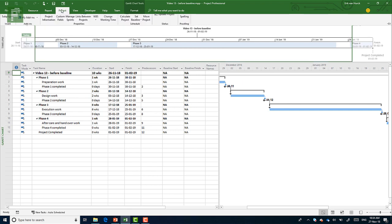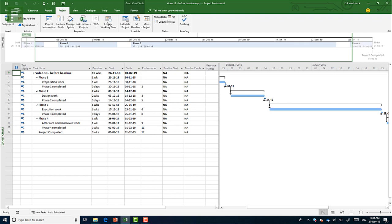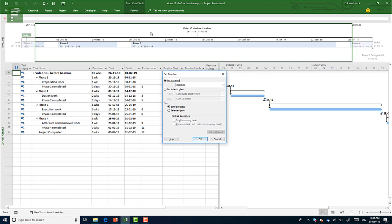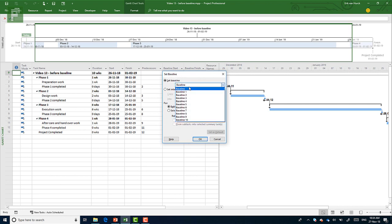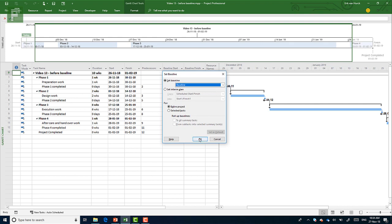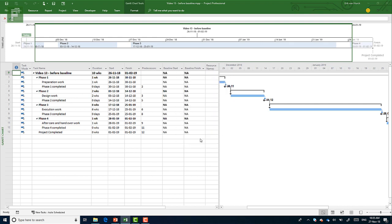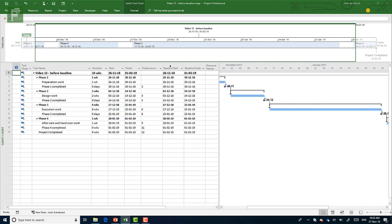But as soon as we click on project, set baseline, and we click again on set baseline, there's this little menu and without going too much detail, there's a lot of baselines that you can set. But let's just go with the basic one where I set baseline for the entire project. And as soon as I do that, these dates are now set in stone.